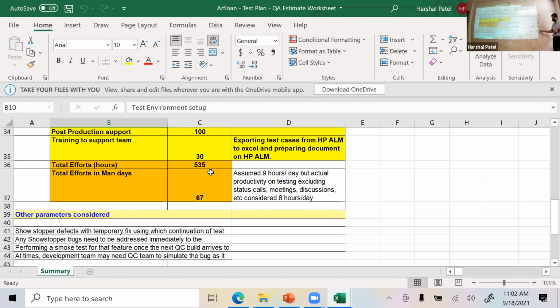Right? And again, there's nothing wrong with this. What I'm pointing out is that as a tester, there's a lot more than just running the test. If you were thinking about all of this time, you were just thinking about running the test. You were not factoring in how long it's going to take me to write the step-by-step instructions, how long it's going to take me to generate or come up with the data. You're not factoring in how many times I'm doing testing. You'll factor all of those things in.